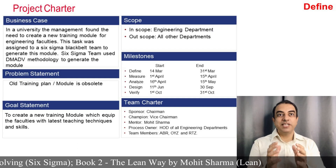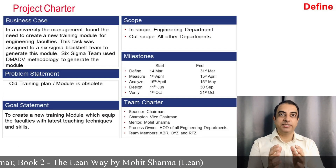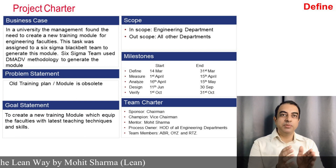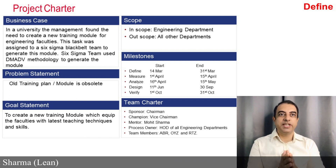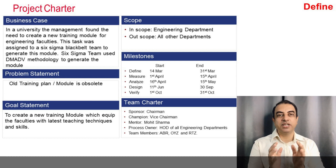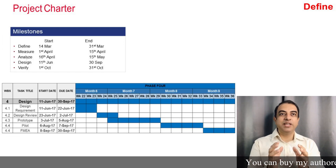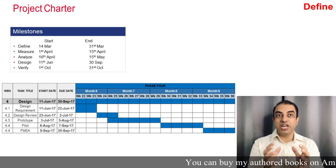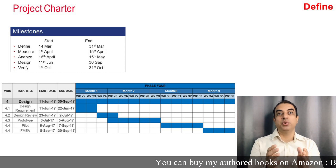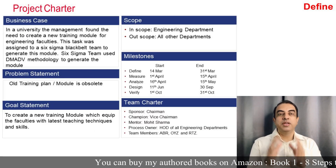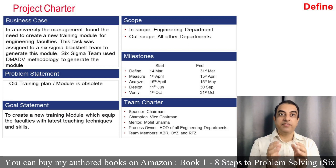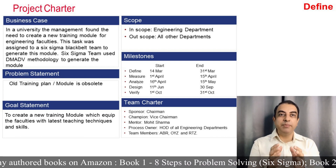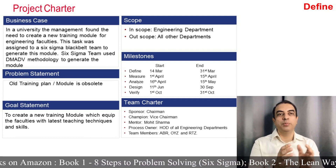The first step is to create a project charter where business case, problem statement, goal statement, scope of the project, timelines and team charter are created. Details of the timelines can be created by using a Gantt chart, like it is shown in this example. Scope of the project is the engineering department and the rest of the departments like BBA, MBA and medicine are out of scope.